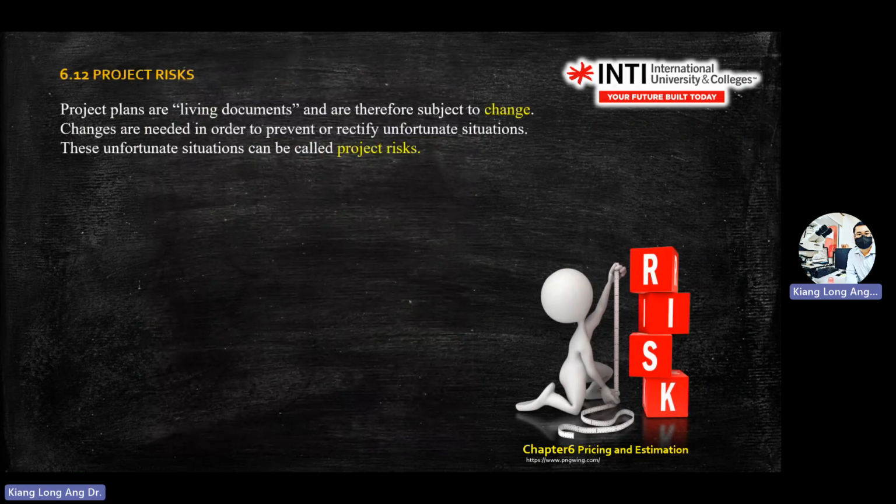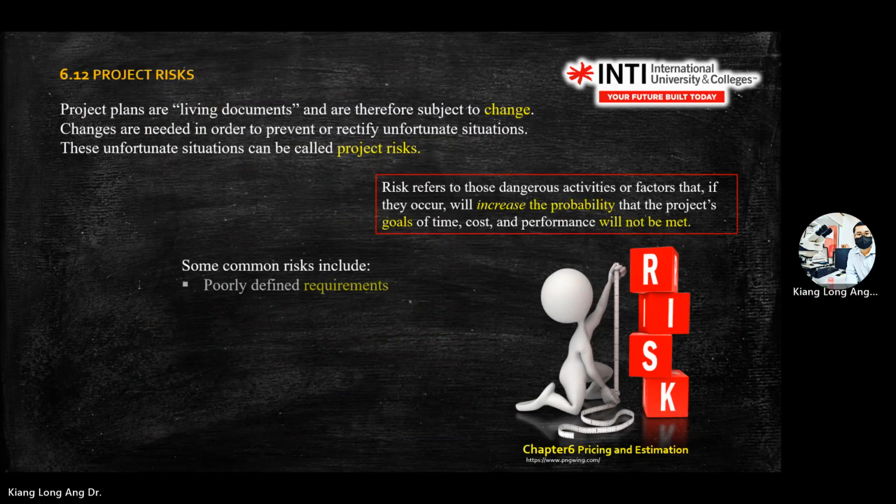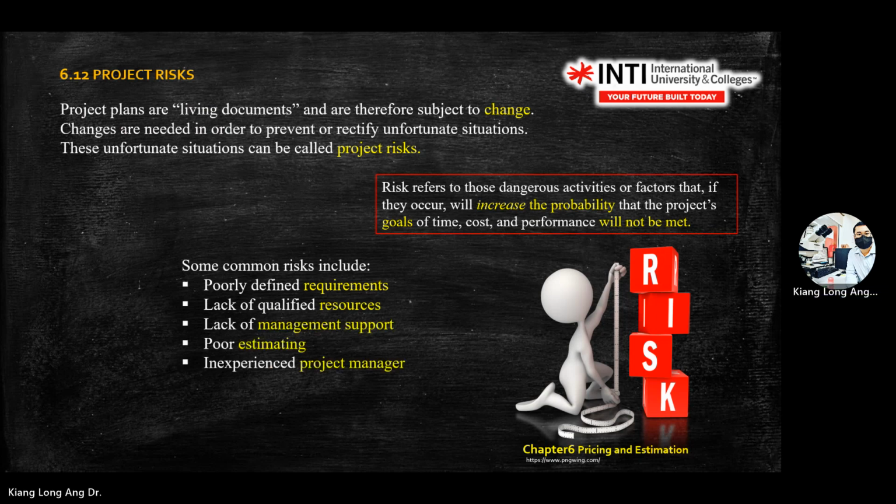Okay. So project risk, this one you read. What is important is why there's a risk happening in the projects. Either you don't have a proper definition of your customer requirement, you don't know what your customer wants, you have a lack of resources, you have a lack of management support, you're poor in doing estimating, means sometimes you have lack of data, especially when you're handling new projects, R&D projects.